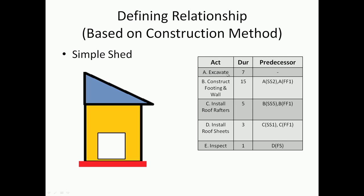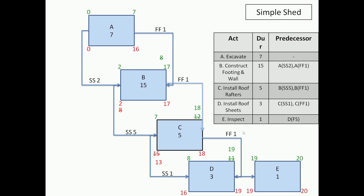The alternative, as we discussed last time, is to break it up into pieces, and in many ways that is a good alternative. If I am going to take excavation and break it into A1, A2, A3, then B1, B2, B3 and C1, C2, C3, and represent it in activity-on-node with several activities, you certainly have to handle more activities, but that is a possible option. But if we are going to do it with a precedence diagramming method, this is how it works out where you have activities A, B, C, D, E and all the relationships defined.